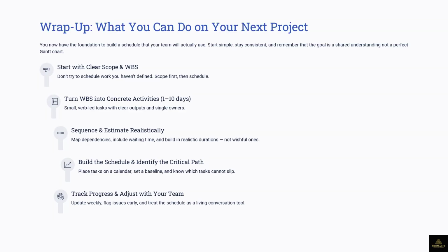So in terms of how they see resources, they are working together basically, and it is you, as a project manager, that make decisions on those resources, and you're also telling the scheduler resources that are available. If the scheduler tells you, oh, 3 resources will be needed to finish this particular deadline day, and as a project manager, you look at it, no, I can't afford to bring in 3 resources. We'll stick to what, 2 days.